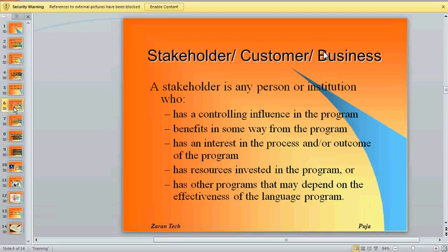small projects, the BA is almost always the project manager. 3 weeks to 3 months, you don't need a separate project manager for it. Remember, a project manager's salary, you've got to pay that person a salary. If it's a small project, you don't have huge budgets for it, right? Do you really want to pay somebody to put together a project plan? No. In which instance, you as a business analyst are also the project manager.